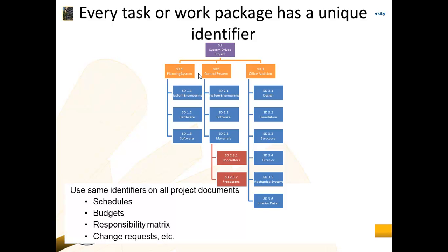and you can't just start and say 1, 2, 3, 4, 5, 6, 7, 8, 9, 10 and just allocate numbers to each block, because at the end of the day, the way that the numbering is broken down and the hierarchy of the numbering shows you where that work package fits into the work breakdown structure.